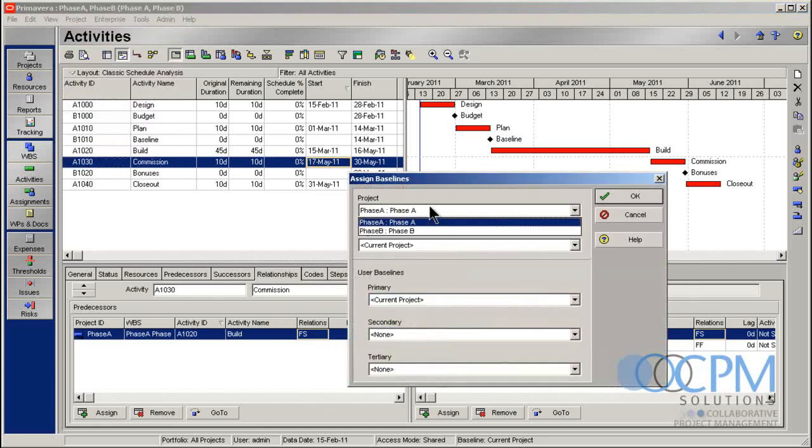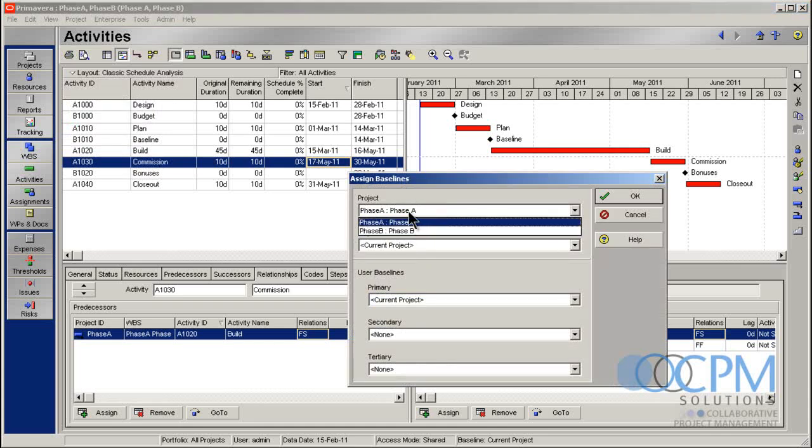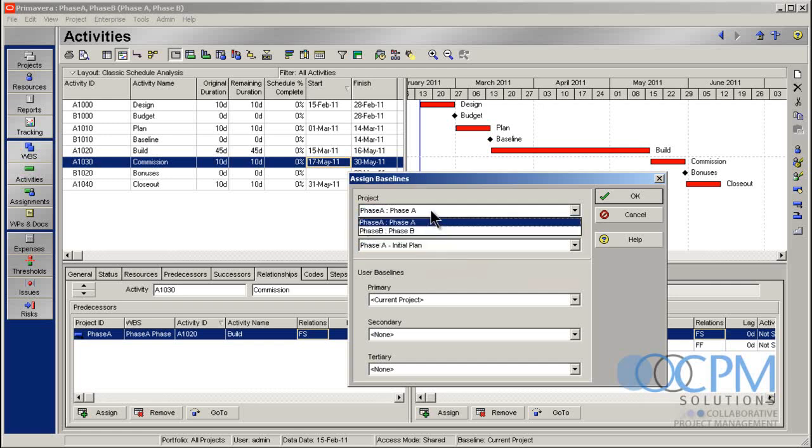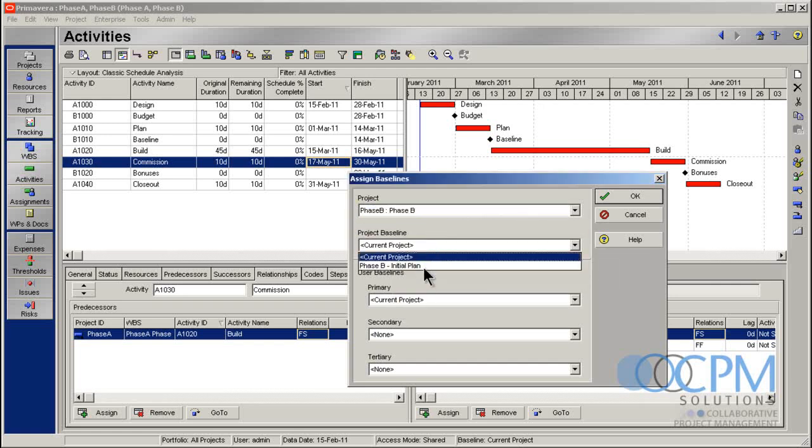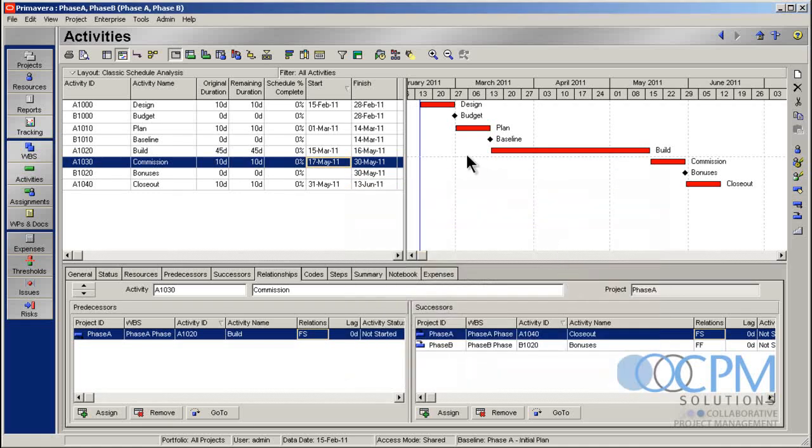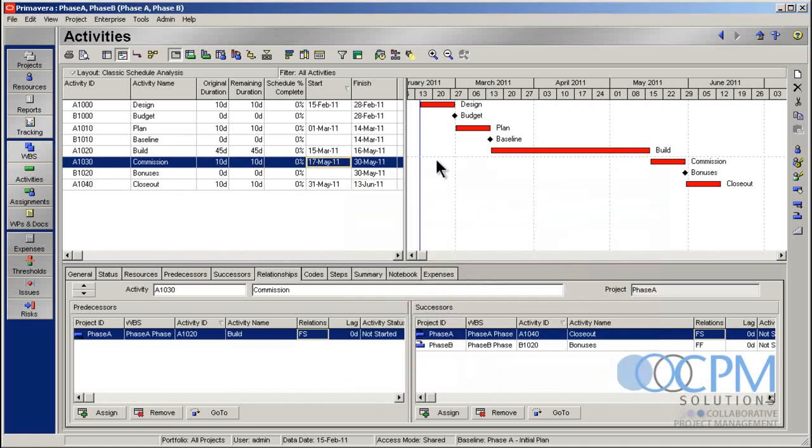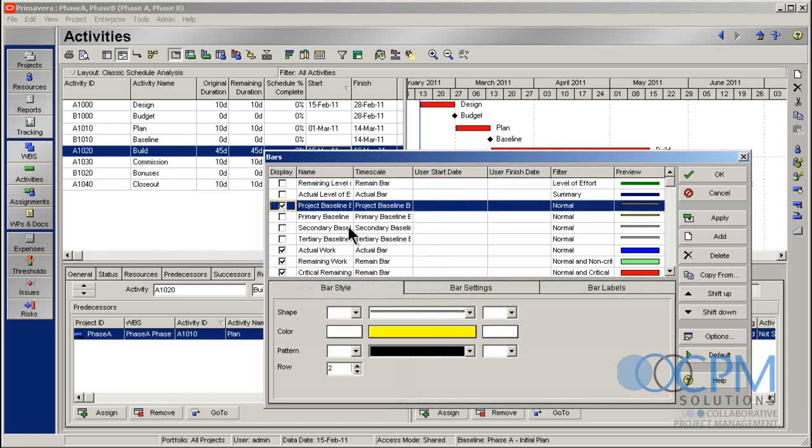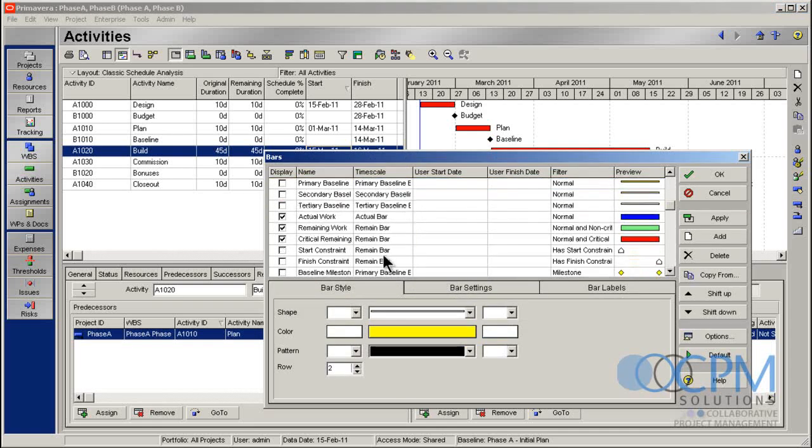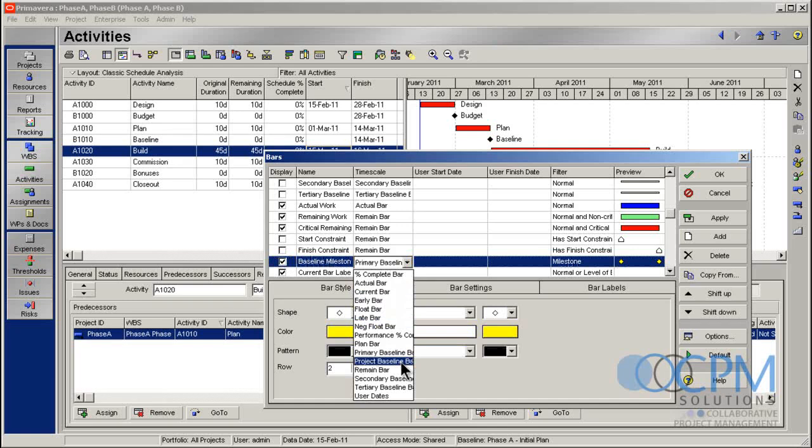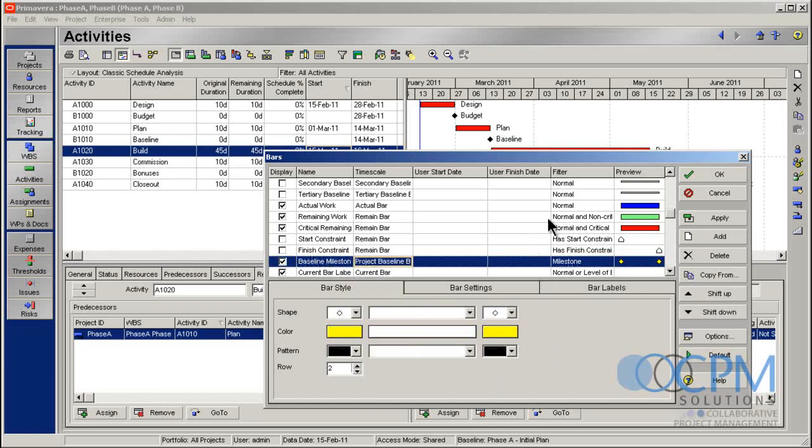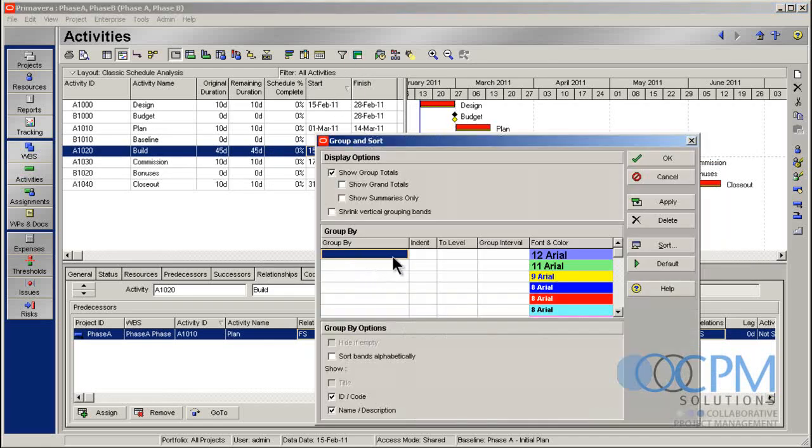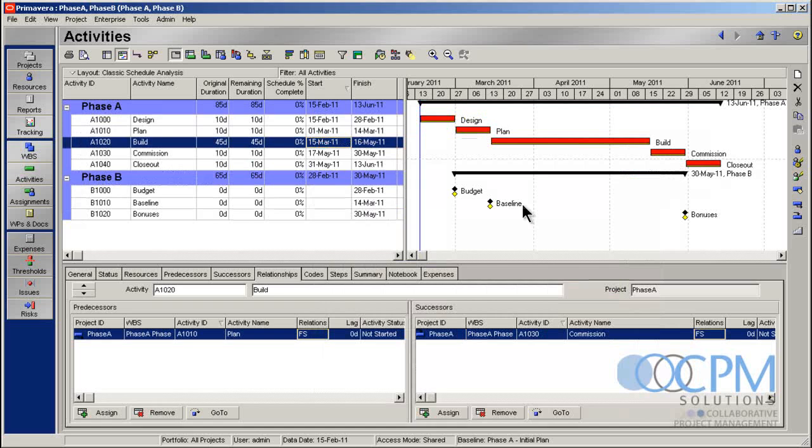Next thing to do is to go and assign those baselines to the projects. So here in my assign baseline, you'll notice I've got two projects I can choose up here. So that's just a little word of warning in case you forget. So project A gets the phase A baseline and project B gets the phase B baseline. Go ahead and assign those. Now let's check them out on the Gantt chart. All I want to do is add in project baseline bars and I also have some milestone bars down here. And I know I need to make a little change here and set this to project. Okay, so there's my baselines displayed on the Gantt chart as well.